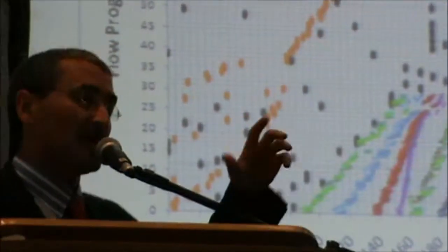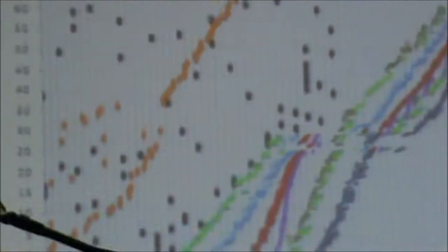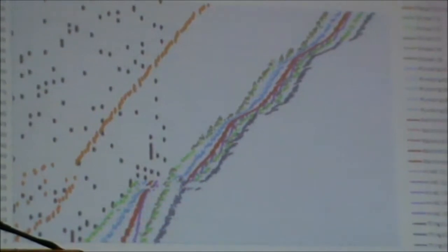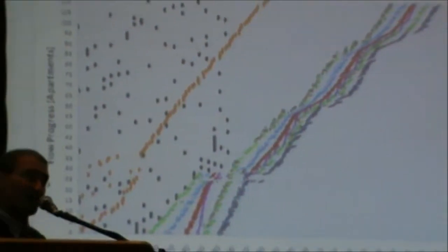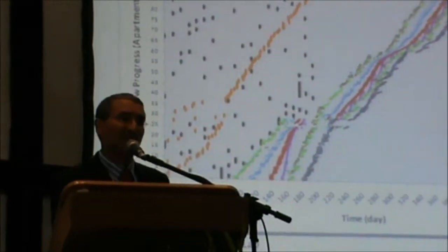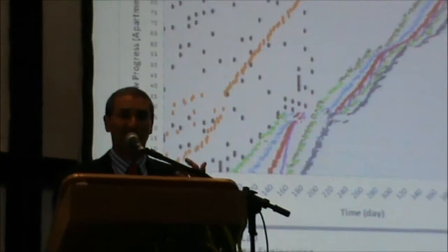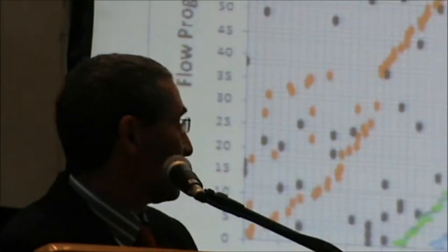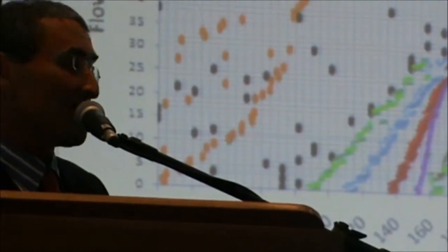Now you see that it's simply being reordered. The structure is now chaotic, but the flow of information is what's driving the rest of the finishing works. And so we have a break between the structure and the finishing works, but we're able to get very smooth, or I should say much smoother flows for the different work teams than we had before, with much fewer and shorter interruptions. But you still see that the reaction phenomenon still creates a problem over here.